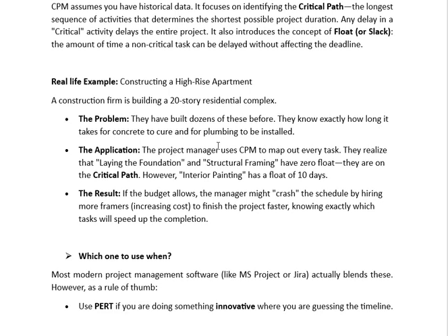The application: the project manager uses CPM to map out every task. They realize that laying the foundation and structural framing have zero float. They are on the critical path, so they are already on the shortest path. However, interior painting has a float of 10 days. What is the float, which I already told you? The amount of time a non-critical task can be delayed without affecting the deadline.